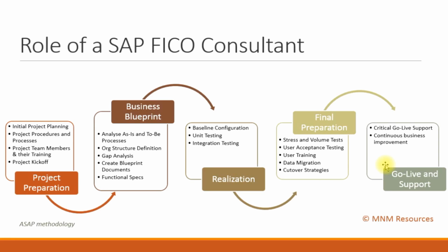And then you start doing the data migration before you go live. This stage, you'll be defining these cutover strategies. So cutover strategy is defining at which date you want to go live, before the go live dates, how we are going to do the data migration, when you're going to do the transport settings, is all the configuration complete, is there any additional stuff needed, are you ready to go live, if there are any changes going to go live. So anything related to the critical go live stage is discussed during the cutover strategies.